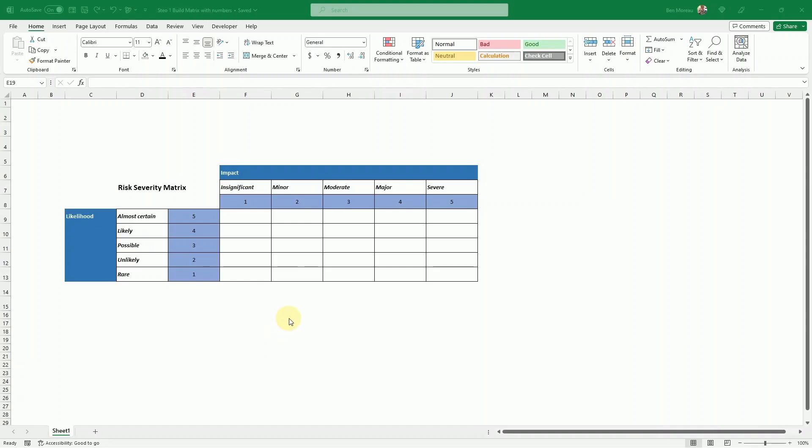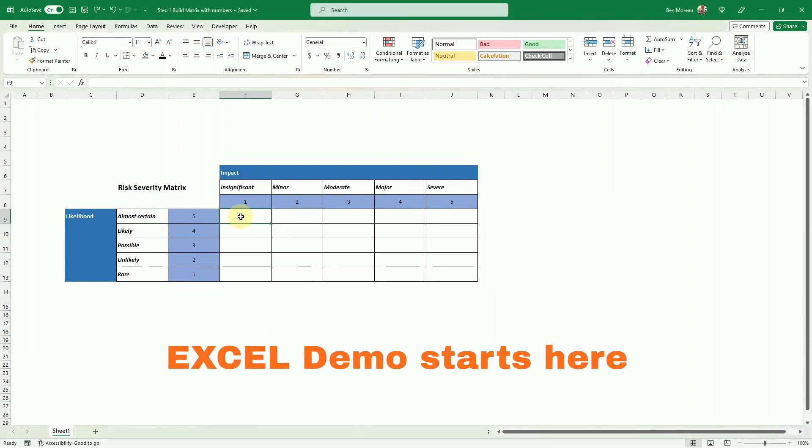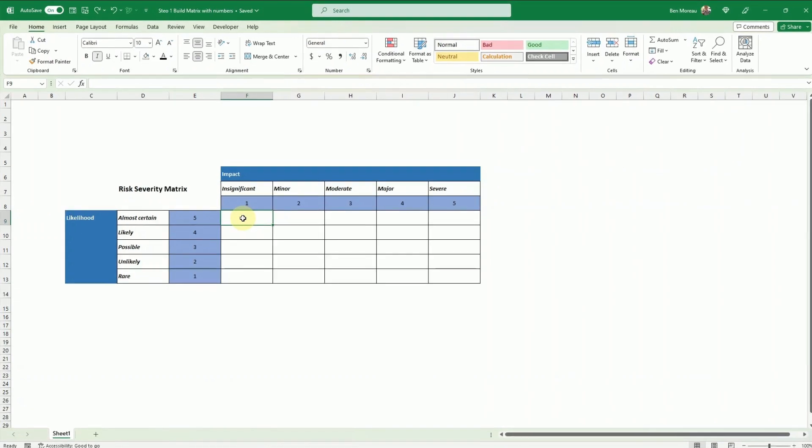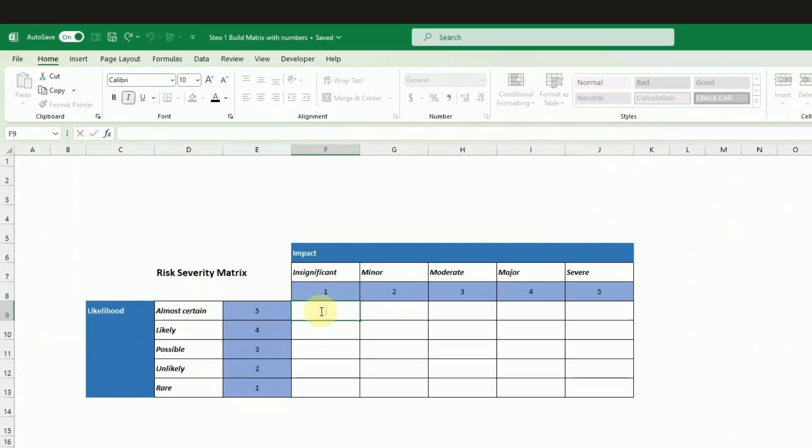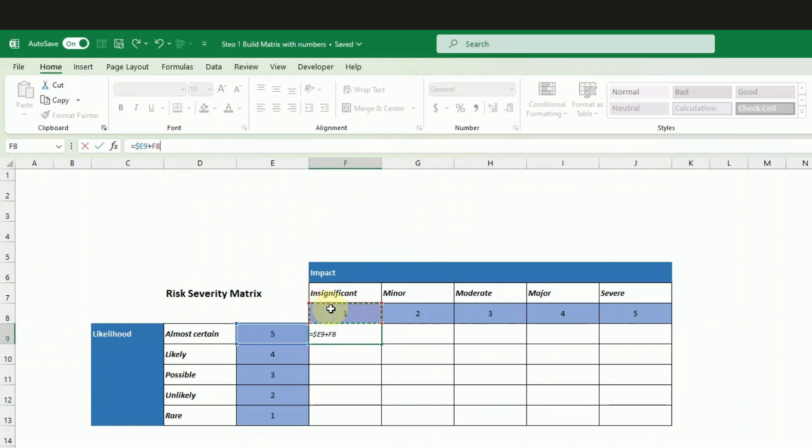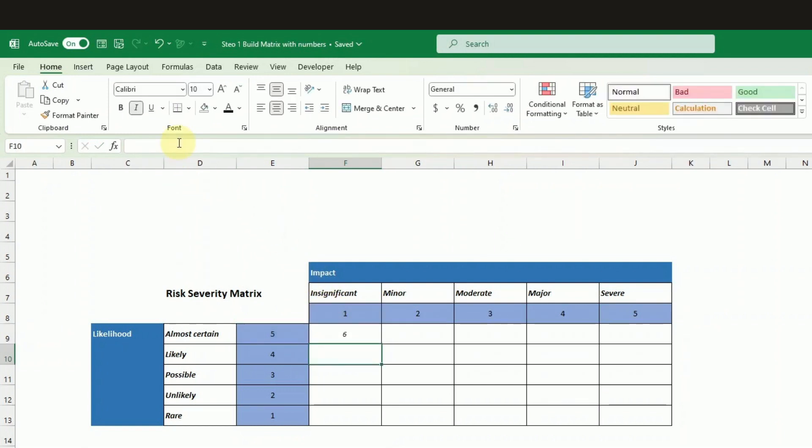So here I have created the severity matrix and I will be just adding the numbers following the example that we gave before. Just by adding the numbers we get the severity. So if I go to the top left I just add the numbers 1 and 5 but I'm very mindful of putting a dollar sign in front of the E so I lock in the columns and I'm putting the dollar sign in front of the 8 so I lock in the rows for the impact.